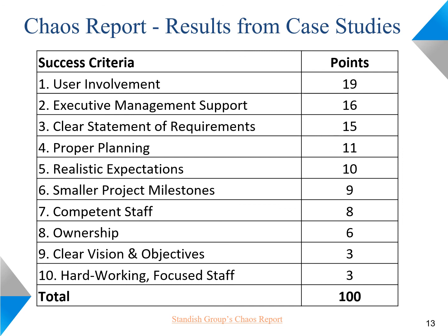In fact, this issue was a problem in the project I mentioned to you that I looked at in US courts, and finally we made the recommendation to stop funding that project, and we did. And the reason for that, they did not have smaller milestones. They went for the big system to be put in place in one shot, and that's why the project went on for a long time and spent a lot of money, and they didn't have much to show for it. Competent staff and so on are other factors, as you can see on this table.